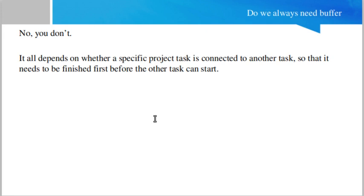Now, there is a question: do we always need a buffer? No, it is not true that we always need a buffer. It depends on whether a specific project task is connected to another task such that it needs to be finished first before the other task can start. So the answer is: we don't always need a buffer — it depends on the situation and the scenario.